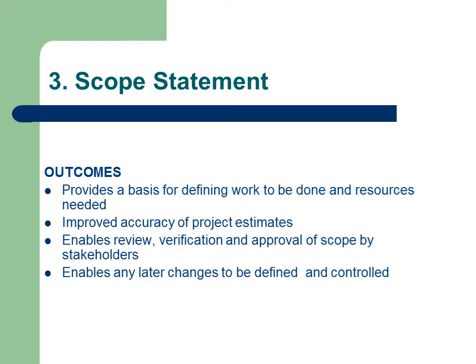The benefits of a well-defined statement are providing a basis for defining work to be done and resources needed; improved accuracy of project estimates because there is less likelihood that something has been forgotten; it enables review, verification and approval of scope by the stakeholders; and importantly, it creates a baseline against which later changes can be defined and controlled.